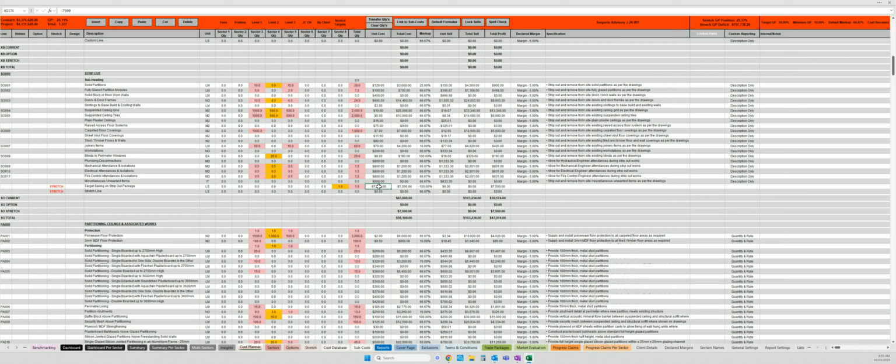Now on the cost side, I said, what if I can save $7,500 while not impacting my sell? So my sell is remaining at zero, but what if I can negotiate or bring that cost down by $7,500? And so what you'll see on the top of the ribbon, it's gone from a current GP of 25.11 to the right, it's now saying 25.33. And the 165,000 has now reduced to 157,000.